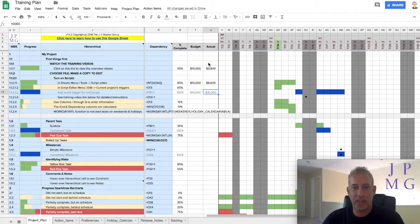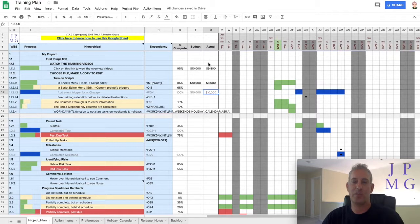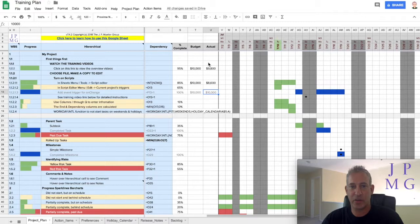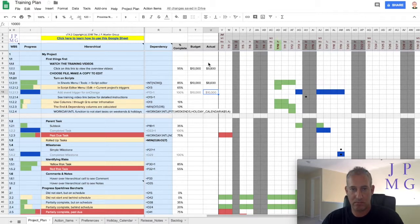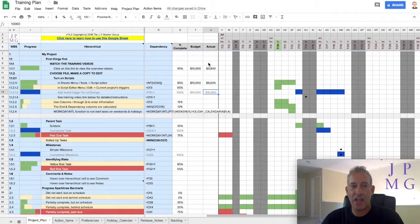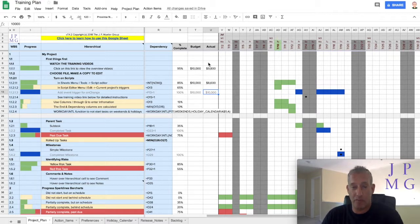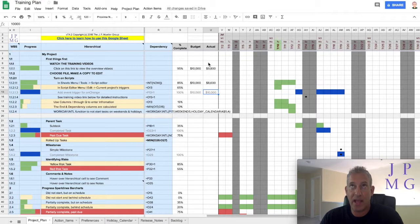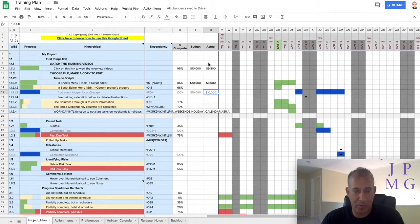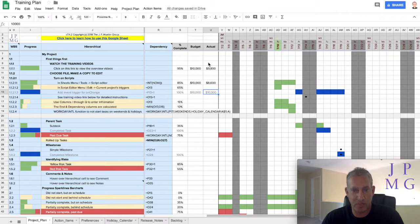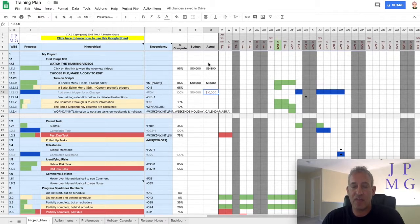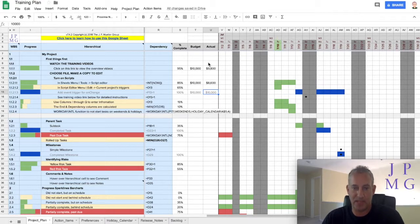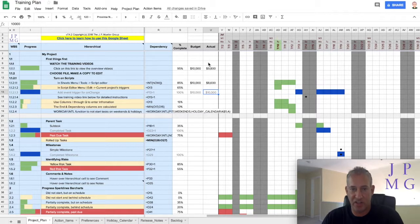And here are my rules. If I'm 100% complete with a task, and my actual spend is less than or equal to budget, then I'm going to make it green. If I'm going over budget relative to the percent complete, and I'm over by more than 3%, and that could be whatever percent you choose, but I'm going to choose 3, I want it to be red. If I'm over, but I'm within 3% of going over, I want it to be yellow. Otherwise, I'll leave it as white.